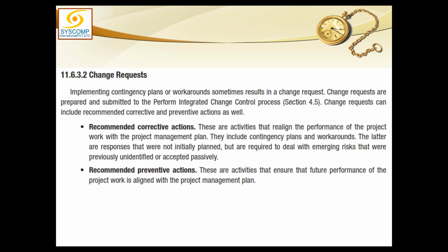Maybe through quality assurance, maybe through other things, we will improve those things and apply those corrections to the actions. Or some of the recommendations could be for preventive actions. A damage has not occurred yet, but it is highly likely that this damage will occur. So the prevention measures you take would be the recommended preventive action.